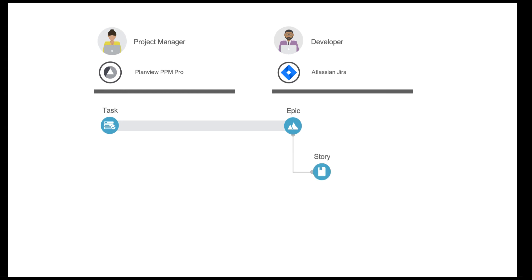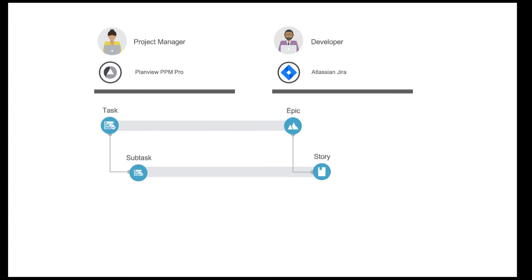In Jira, the developer team lead will break down those epics into stories, which Tasktop will flow back to PPM Pro as subtasks. When story work logs are filled out in Jira, the work logs will flow back to PPM Pro and roll up to epics in PPM Pro, for the project manager to track development time. This eliminates the need for developers to go into another tool to fill in project timesheets.